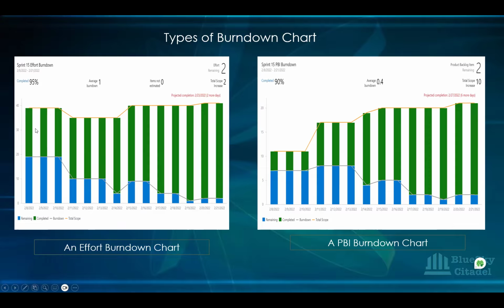Now, remember when I was showing us the other one that time, I did say that when they started, as you can see, they had a burn down of 3 days. You can see it is flat. So that means apart from this green, for the first 3 days that they completed, nothing else burned down until the fourth day they went down. And then you can see 4 days. You can't say work was static. So actually it's not as if they're not working. So don't get it wrong and say, oh Tim, for 4 days you're not doing anything. What you're looking at is, okay, for 4 days it's possible that we're not burning anything.